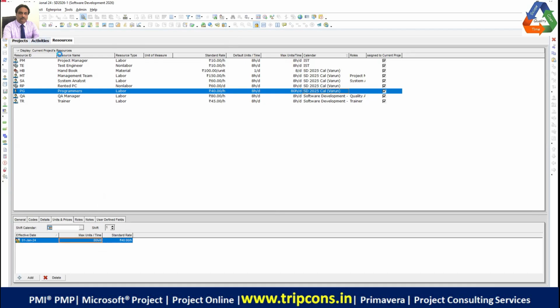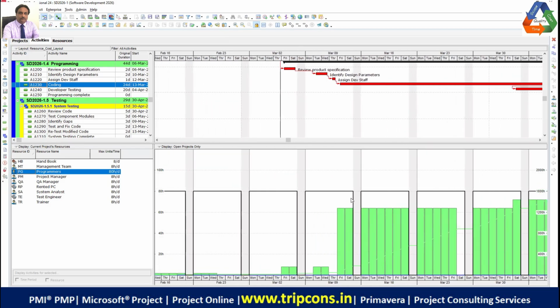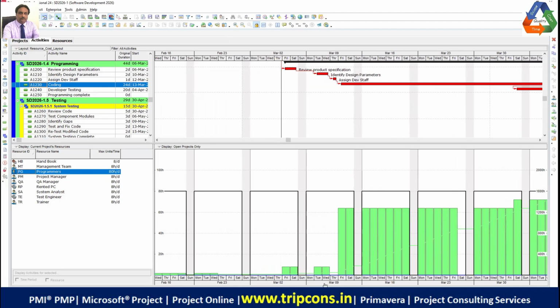Now let's look at the activities window once again. So guys, you will see the resource capacity has been upgraded to 80 man hours per day. So all the utilization of the resource which is below the capacity is now green. So green means that you are utilizing the resource under the capacity or up to the capacity. That's okay. Now you may use this approved capacity up to the maximum, and you can use it below the maximum. That's okay. If you look at these dates of the week of this March, you are using only one out of the approved capacity of 10.